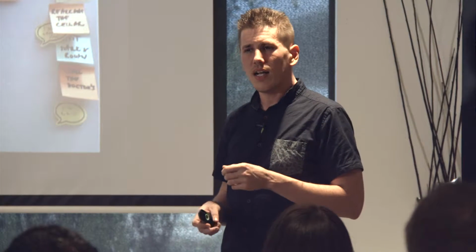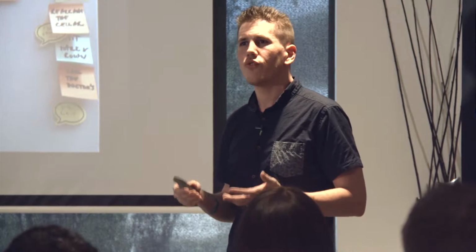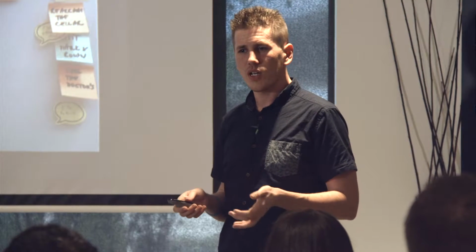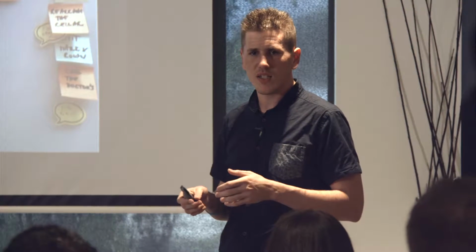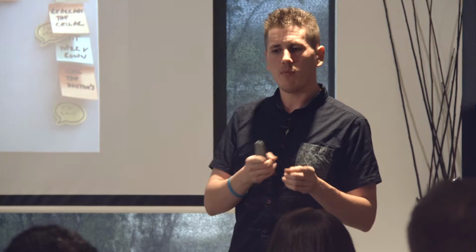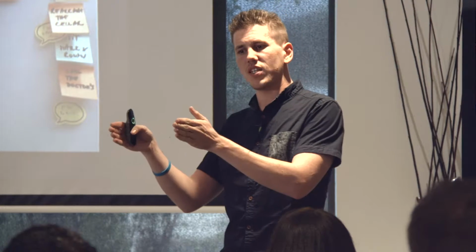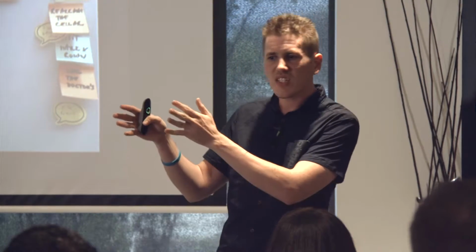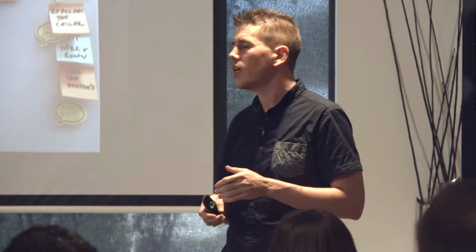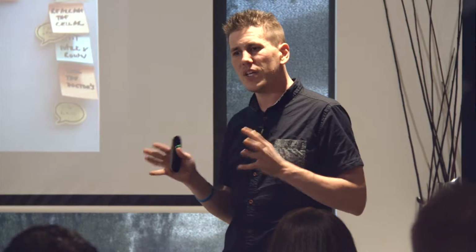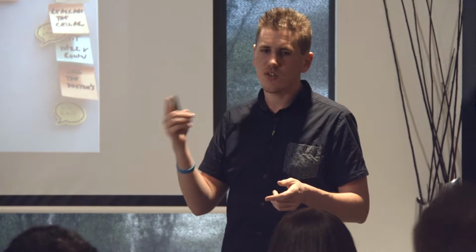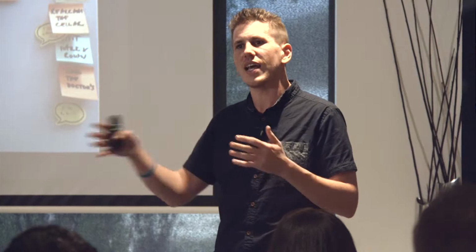You should never, and this is one of the more controversial things that people, Jira, the big Atlassian workflow management tool, allows tasks to travel back. You might find an issue in testing and you will send that feature back to development again and sort of start the process off again. One of the concepts in Kanban is a piece of work will never travel backward, because if a piece of work can travel backward, you can end up in a constant cycle where nothing actually ever gets done.